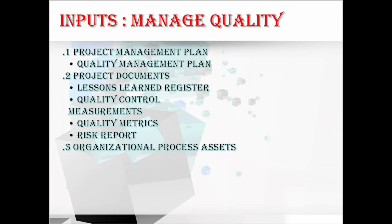The next input is organizational process assets (OPA). In OPA, we have the organizational quality management system, which includes policies, procedures, and guidelines, as well as quality templates including checksheets, traceability metrics, test plans, test documents, and others. We also have results from previous audits and the lessons learned register with information from similar projects.